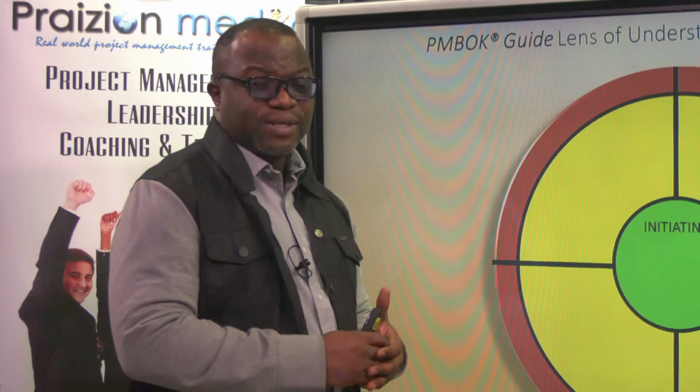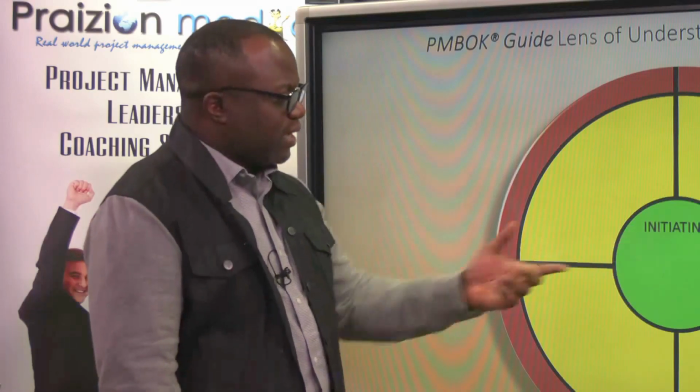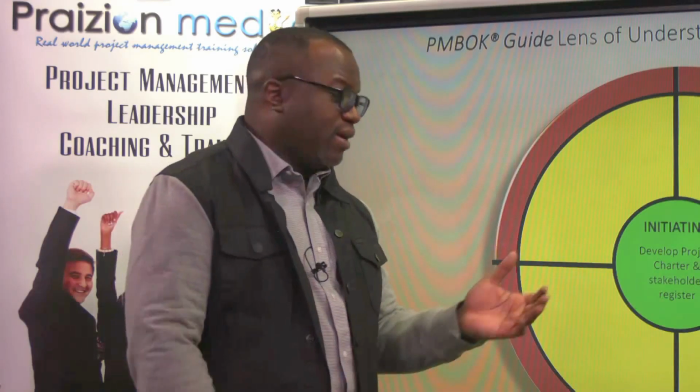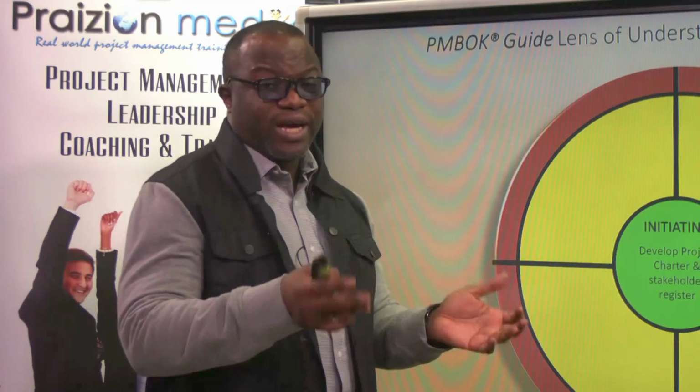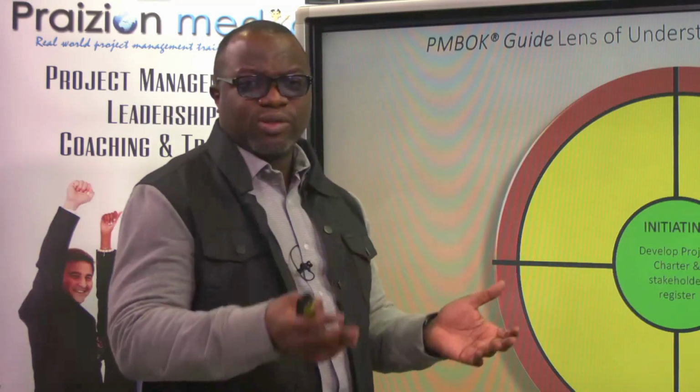The best answer is your project charter. It's the basis, and that's exactly what you do here. You develop a project charter in initiating, and you create a stakeholder register. A lot of people are not aware of the importance of the project charter. You see, in the world of the PMI, this is one of the sacred cows, the project charter. How can you work on a project if it's not authorized?